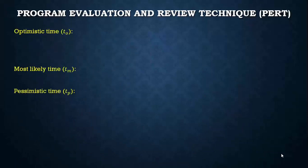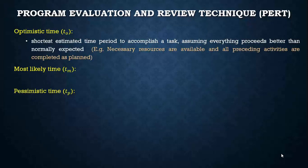The different time estimates are optimistic time, most likely time, and pessimistic time. Optimistic time is the shortest estimated time period to accomplish a task, assuming everything proceeds better than normally expected. Example cases include when all necessary resources are available and all preceding activities are completed in time as planned.